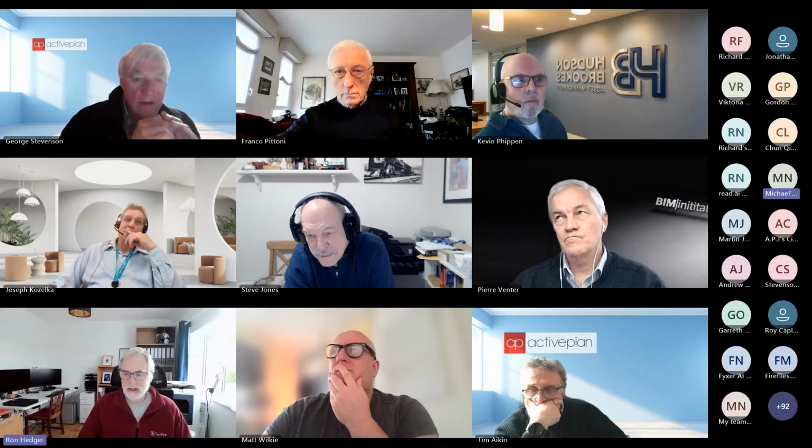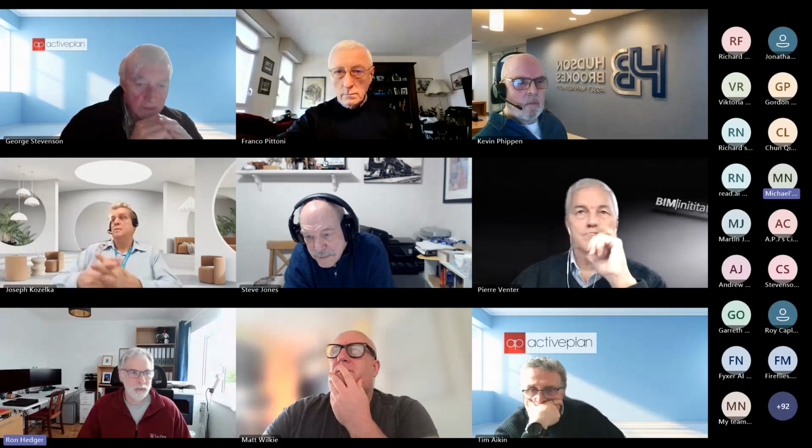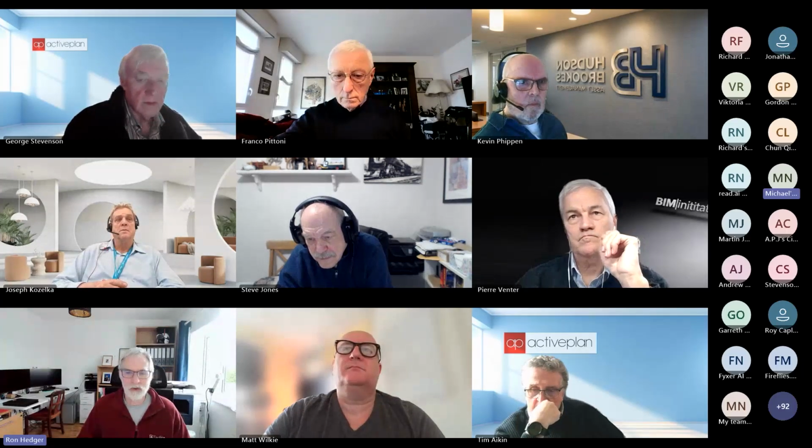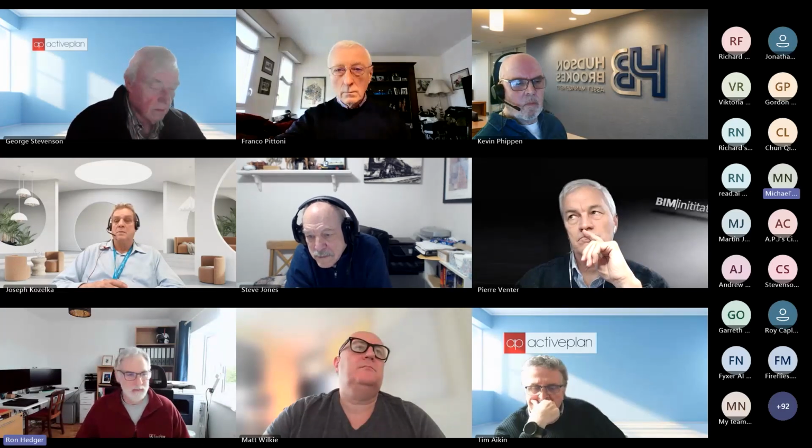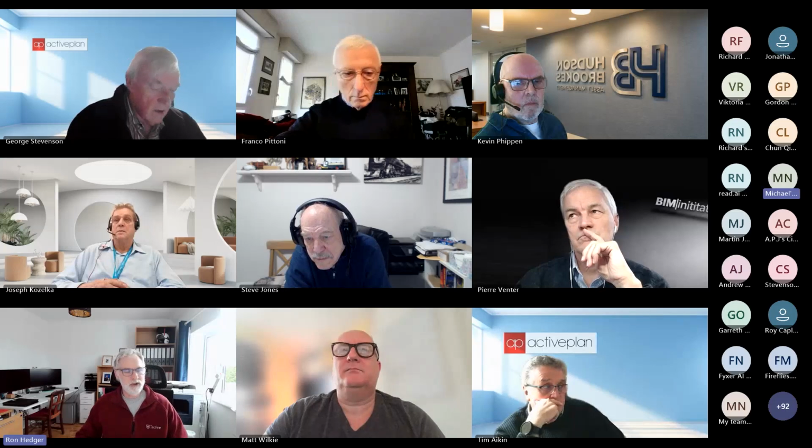Yes. So Regulation 38, building Regulation 38, applies to the sign-off and completion of works that are controlled under the building regulations. I put that in because Matt, you appeared to be referring to Regulation 38 as an ongoing record of the fire precautions within a building over a maybe 20-year period of change.